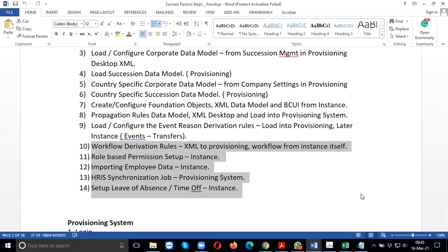But again, it will always be scenario specific, right? For Employee Central implementation alone, it takes around 9 to 10 months sometimes, if it is a full cloud implementation. If it is a hybrid model, wherein they are already working on ERP and only moving Employee Central to the cloud, it might take a little less time, but generally 6 to 9 months is the bare minimum.